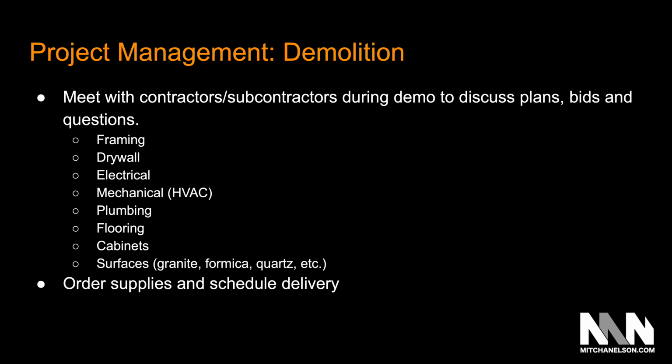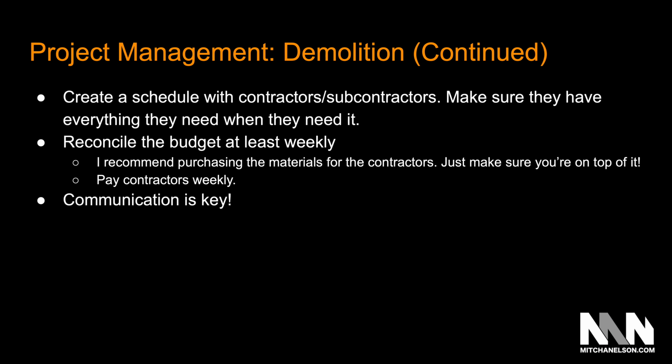Once you've had that meeting and you've discussed all of those plans, you've got your quantities together on what you need for each one of those properties, order your supplies and schedule the delivery so that the supplies are on site. I like to use the garage at the property, if it has one, as a staging area for all of those supplies. So we can just have it on site and the contractors can just grab them and use them as they're needed. That helps with the timeline.